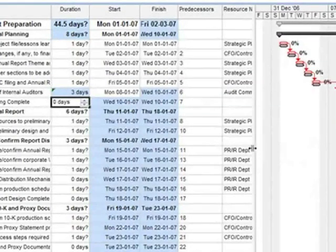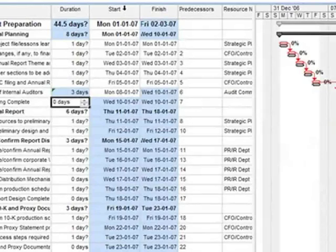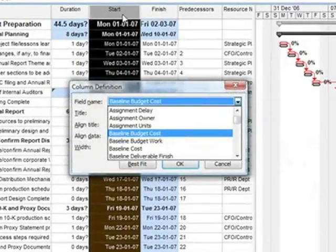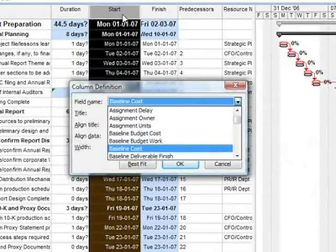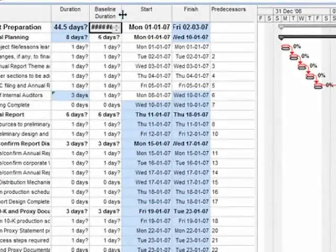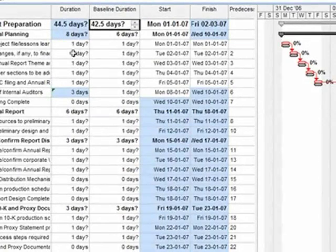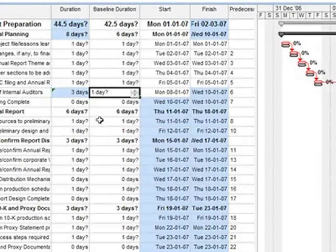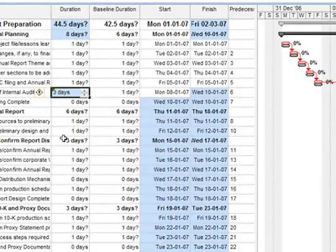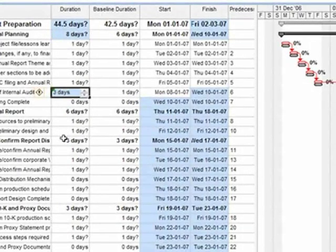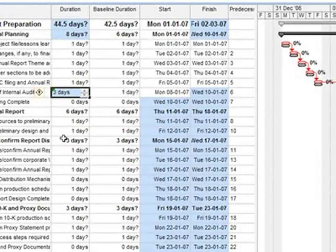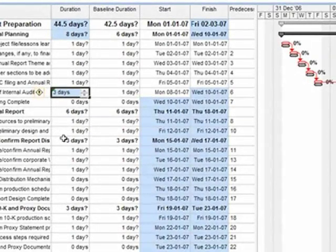If you would like to see baseline values for each and every task, then you can easily insert baseline columns. For example, I will insert baseline duration. So I have original planned duration and I have current duration. So one was originally planned and saved as a baseline, and three is actual or the current duration. So at any stage in your project if you would like to track progress in terms of current as to what was planned, then baseline is very handy.